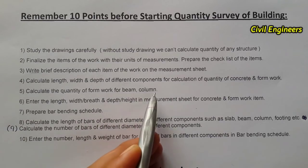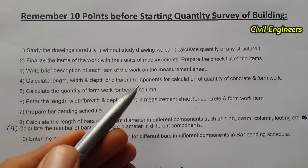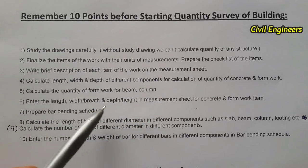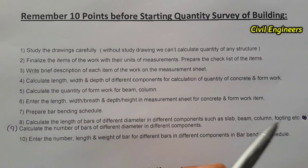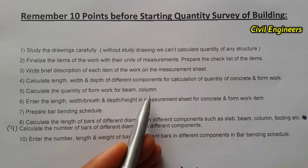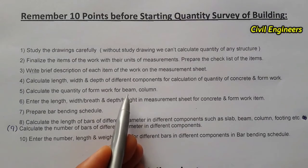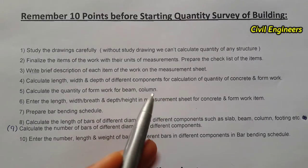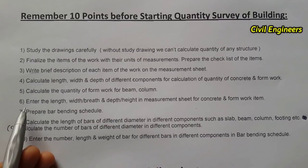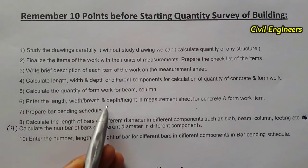The fifth point is to calculate the quantity of formwork for beams and columns. Many people find the quantity of a structure but sometimes forget the quantity of formwork for beams and columns, so keep this point in mind when finding the quantity of any structure in civil engineering.